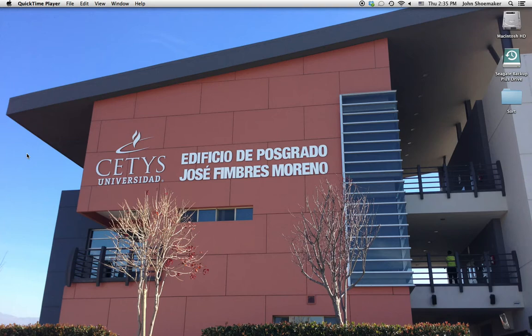Now remember, when we add up the costs, we're adding up the cost of the work packages, not the sub-projects. We don't estimate the cost of sub-projects any more than we schedule them. What we do is, if we want to know what the cost of a sub-project is, we simply add up the work packages within that particular sub-project. And that gives us the ability to report costs at the work package level, or at multiple sub-project levels, or at the level of the project as a whole.